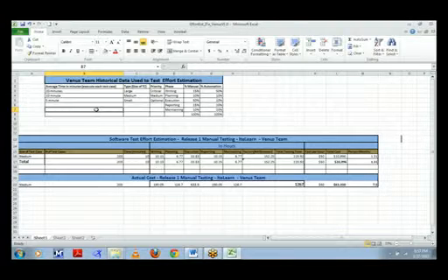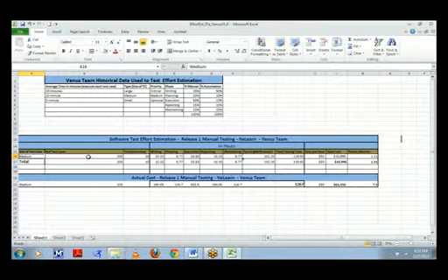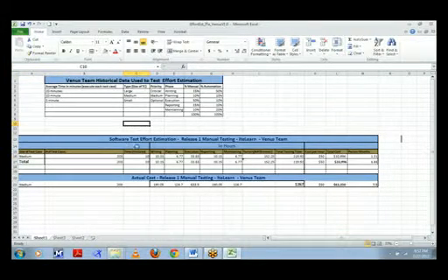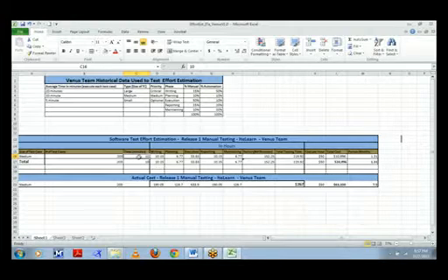In our testing of this application, IT eLearn, our team categorized all the test cases as medium size, and we had about 203 test cases. According to our historical data, we estimated the time as 10 minutes per test case. This is the known factor, and it is very important. This is one of the data we collect during the testing activities. Based on this, we find out how much time it took for execution, reporting, and maintaining.